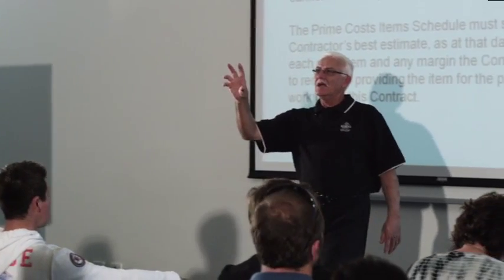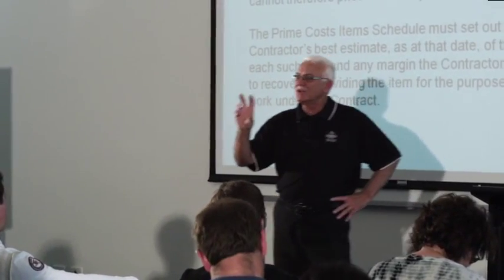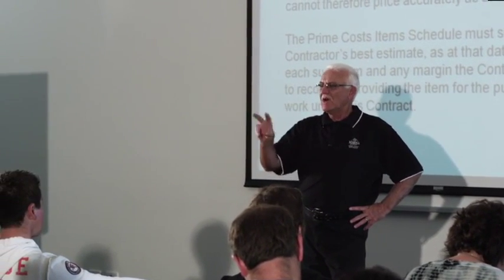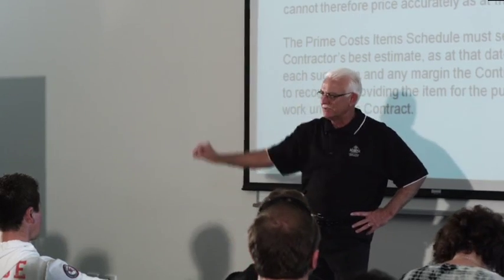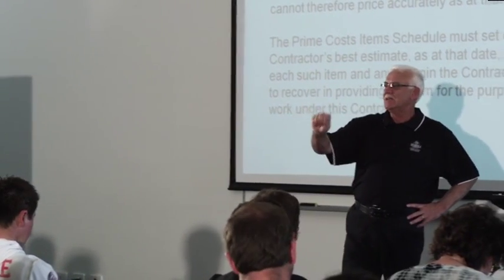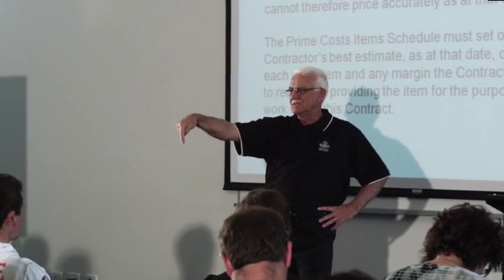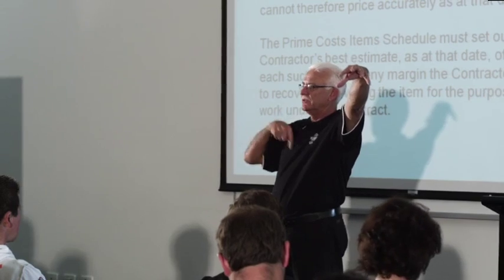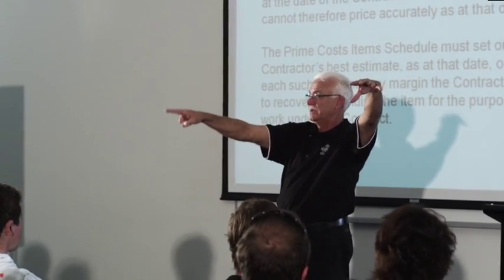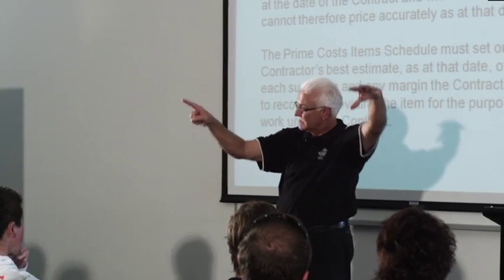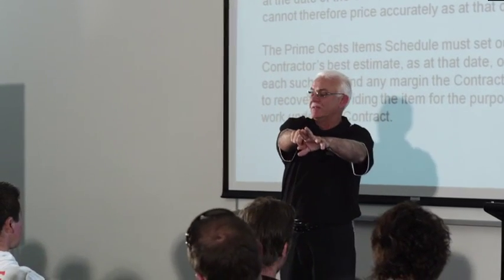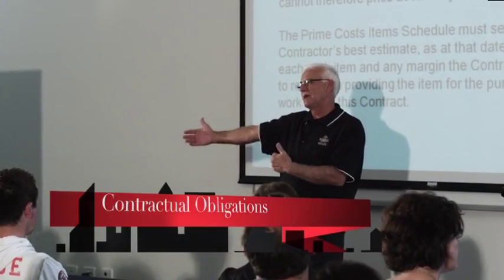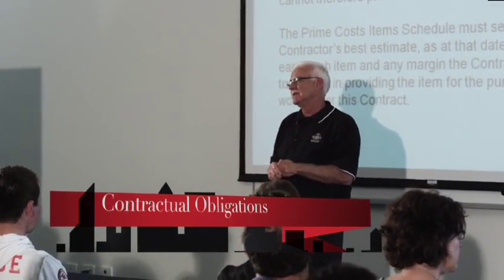And that, we're going to talk about insurance, but you've also got to be aware, and you probably are, that when you become a builder, you are responsible for everything that happens on that site, right? BSA are going to come to you as the builder in the first instance. What you do with your contractors is up to you. The BSA is going to come to you, builder, and say, builder, you are wrong, you fix it, right? Then it's up to you to go and sort it out with your contract. They're not going to, so you will be responsible. It's your contractual obligation, as Damien said.